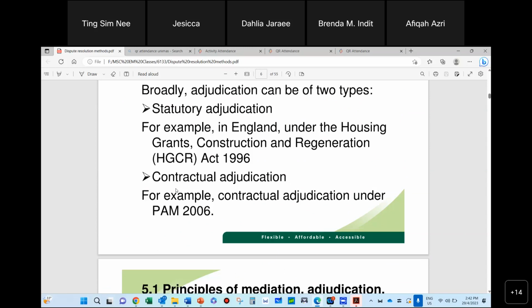And when we talk about dispute, there's two things that we always dispute over. Number one is the technical issues. Number two is a legal issue. If the contract has a legal issue, like for example, there's some misrepresentation, there's some mistake in the contract, or some clauses are unfair, etc., etc. These kinds of issues are not good if you go for adjudication or arbitration. That one you have to go to court. Okay, or arbitration could be okay also.